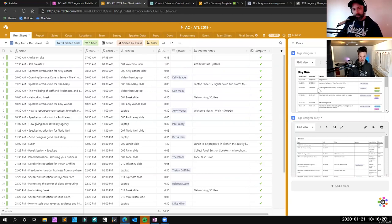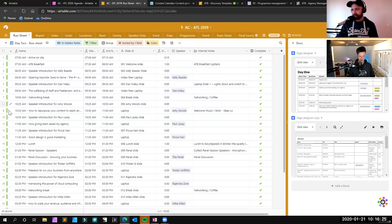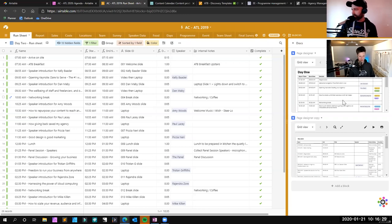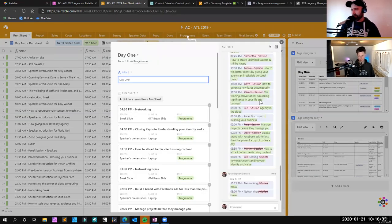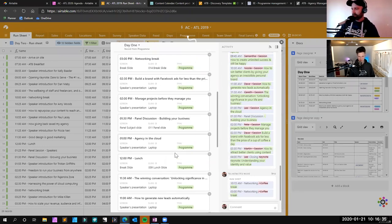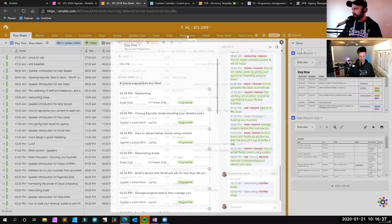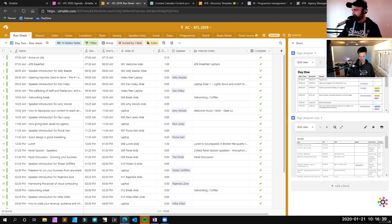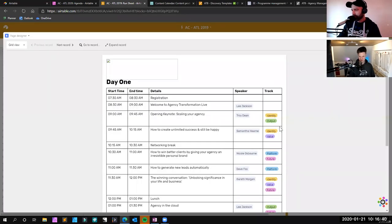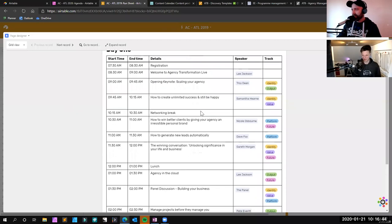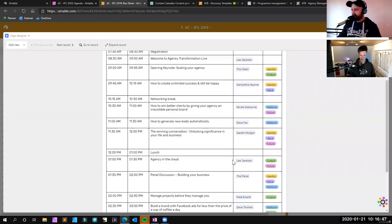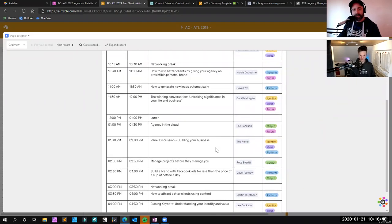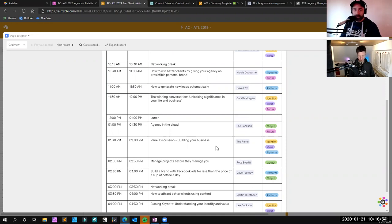We set up this run sheet so we knew exactly what slide was happening. So this is 2019 down to the minute. You know, we had five seconds. We knew that this was going to go up and on. This particular slide would be up for the last five minutes, so that we had an entire build. And because everyone had it on their apps as well, we had certain people who were responsible for checking off each and every section as we went through the entire day. What that also did for us, which is why we've got the premium features, is obviously it gave us things like the colorization so we could see when things were completed and we could filter things.